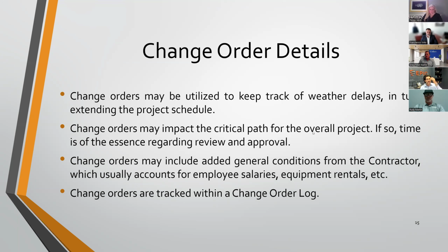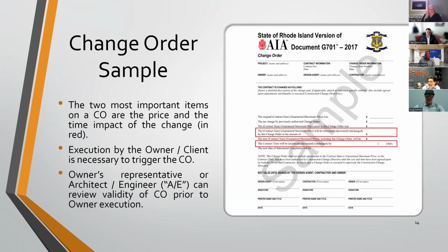Right. So from the aspect of quality and design and quality teams, the planning stage really is the point where you need to make sure, and you hear this term all the time, we need to have 100% CDs, a fully designed document set. And if you go out to bid and you're getting hundreds and hundreds of RFIs, then unfortunately it probably means that the document set was not really well designed, right? Which means they left a bunch of gaps in scope, and items that need cost basis against them cannot be defined without a response from the architect or engineer. And that is really, at the end of the day, what drives a change order.